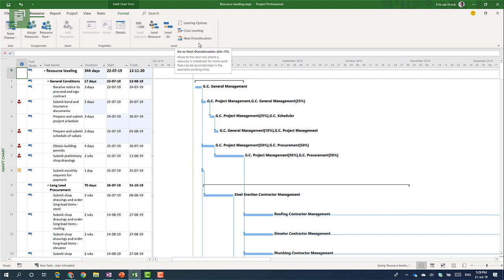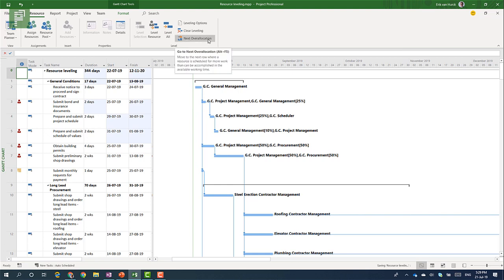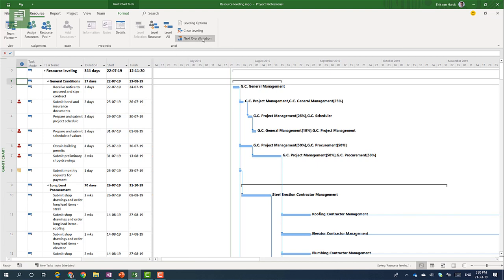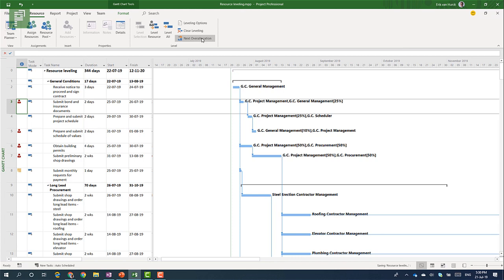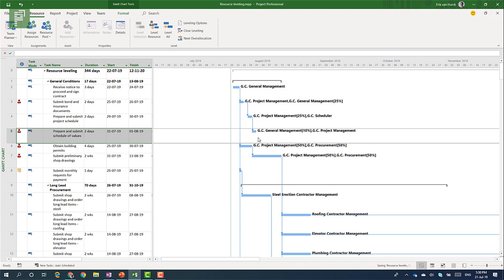So the next over allocation looks at time rather than placement in the Gantt chart. For instance, it will skip to this task which is the first task with an over allocation. But then it will skip row number five because if you look closely, row number five is later in time than the obtained building permits. So let's have a look at that.